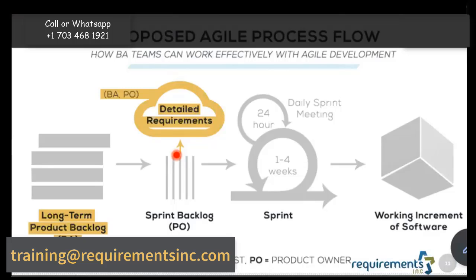Now I pick up the next story and I'm like, okay, is this more complex than the previous one that we looked at or less complex? If it's more complex, it has to be at least a 3 or more, right? If it's less complex, it has to be probably 1 or so. So you take a story and you mark that as whatever story points you want. You can say, okay, this one I'm going to call it a 2.